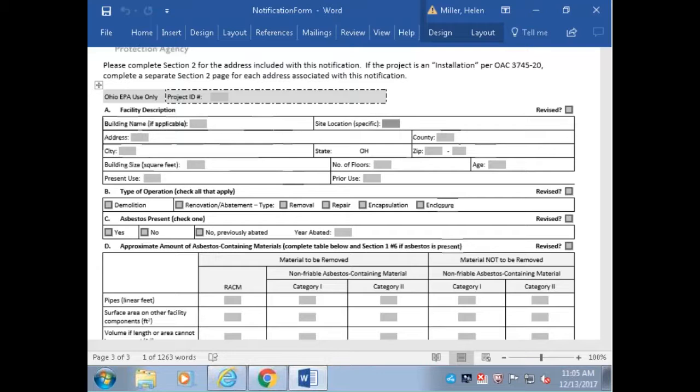Do we have to wait until the 21st to utilize the new form and send to Central? Can we start now for sake of simplicity? For any project that's going to occur after January 1st, yes. Right, so anything after January 1st, because the rules technically take effect January 1st, you should be doing it on the new form for any project after January 1st.